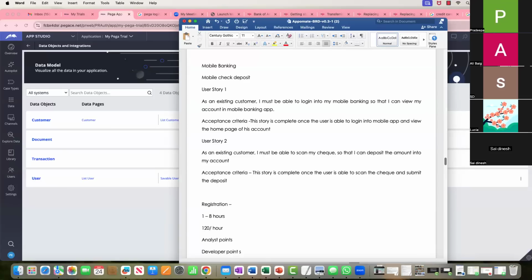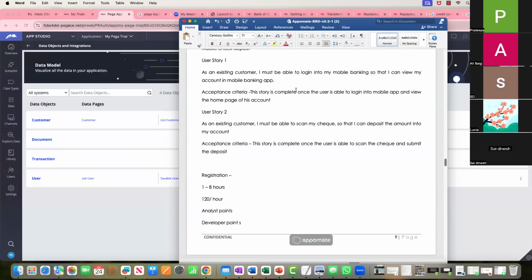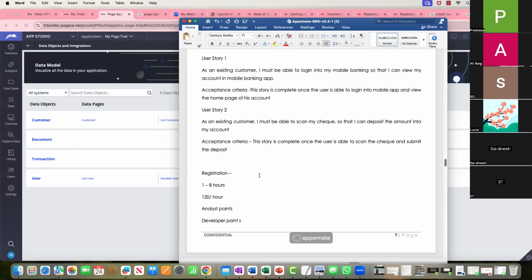You have to give points based upon how long it will take for you to gather requirements for documentation, and then for the developer to develop, the tester to test, and us to push the code to UAT. And for go live, like I told you, you have to create tickets and have all the solicitation calls with them. So completely end to end, in order for these two stories to go live, tell me the story points. Approximately 150.